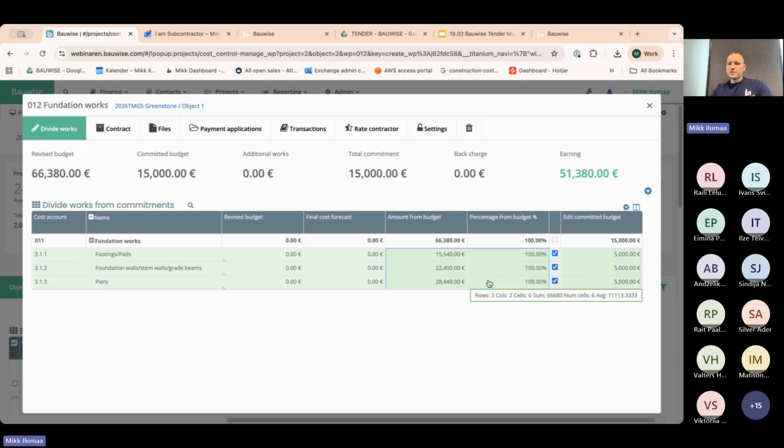In this view, if you still need to change something, let's say that you found a contractor, but this contractor will not use all the money you were actually taking into this, you're able to change these numbers. So for example, you know that you will have a tender for 100% of the works, but actually the end result is that you only get 25%, and it makes sense. So you can take only 25% of the money to the tender and send everything back to the outstanding budget. In this case, I will not do that right now.